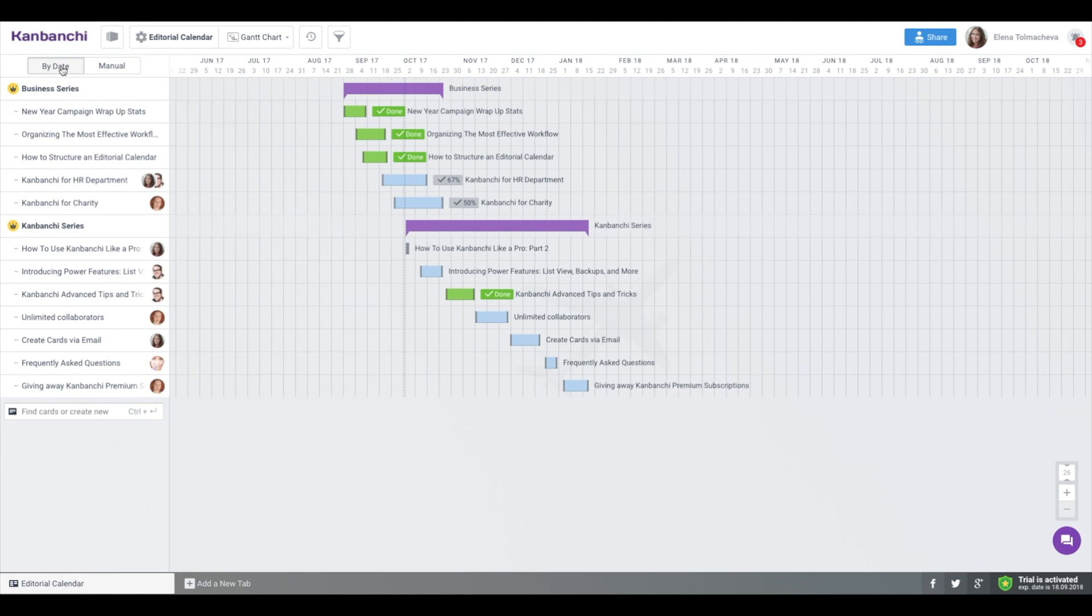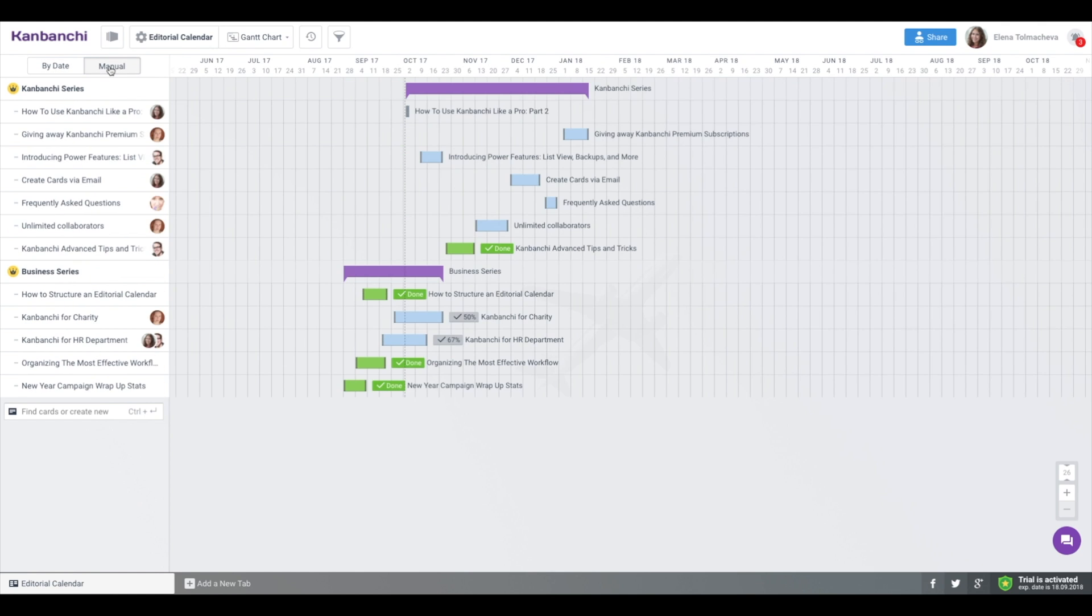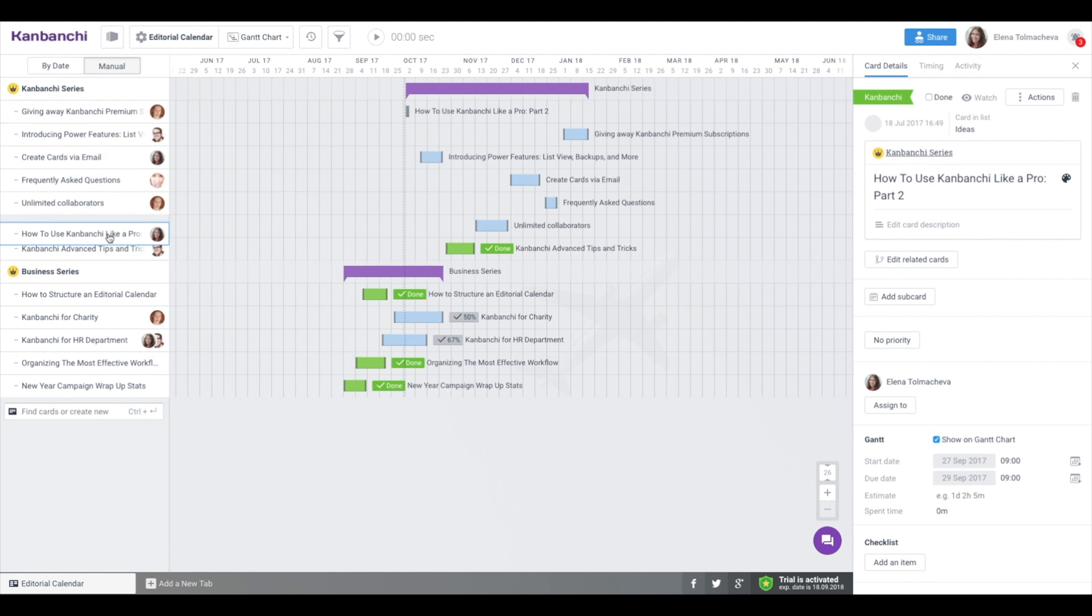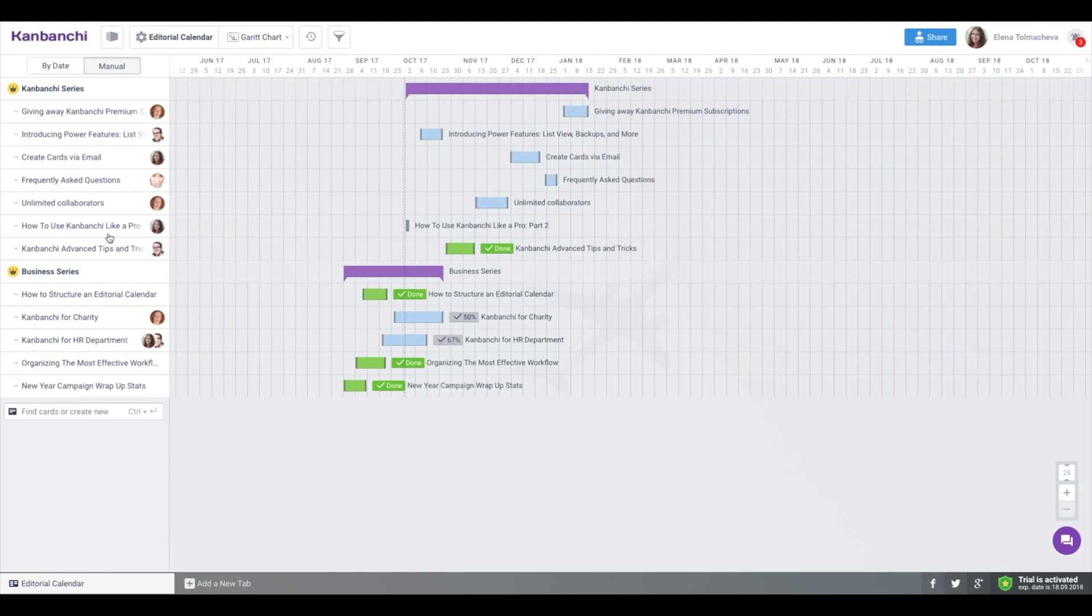Gantt chart now has two sorting modes. Sorting by date automatically creates a waterfall chart for you. Or, if it's not quite right for your project, you can choose manual sorting. CanBanchi remembers the last mode used.